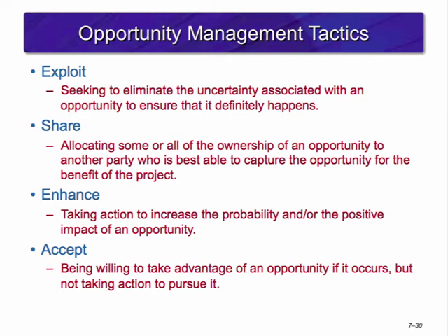Third, enhance. This is the opposite of mitigation. In this, action is taken to increase the probability of the opportunity happening. Examples include choosing materials that are likely to decline in price over time. And finally, accept. Accepting an opportunity is being willing to take advantage of it if it occurs, but not taking action to make it happen.